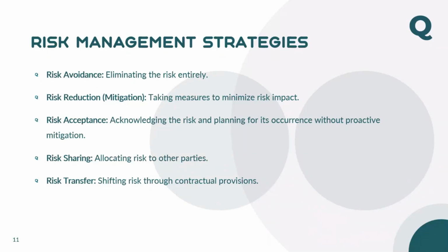Because for risks like authority requirements, access, building permit, the contractor is not the right person. It's better to do with the employer, because they have prepared the concept drawing, all the drawings, everything. They submit to the authority for approval, and the employer is a better person to handle those things. So what we do basically, we transfer that risk to the employer. So this is basically how we mitigate and how we choose the right methodology against each risk.